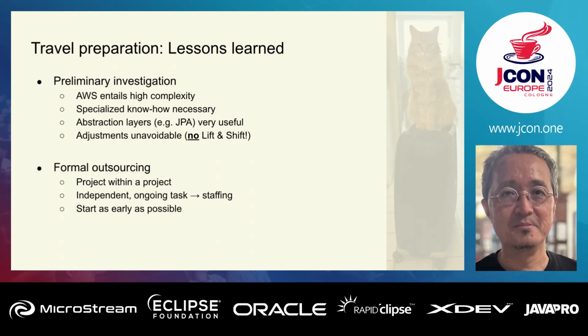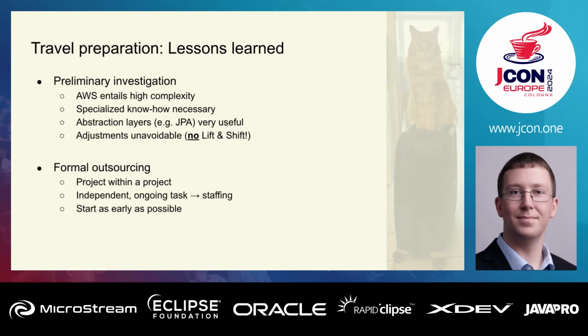So you have to do a lot of documentation, you have to do a lot of talks with people, get approvals, get agreements, just to be fine with regulatory demands, and that takes some time. And we found out that you can more or less define a specific person that does that throughout the whole project. So you really need to spend resources on that, because otherwise you will be ready on a technical level and you still can't deploy to production because regulations say no, it's not possible because we don't have the approval for that. Of course, that's a problem.